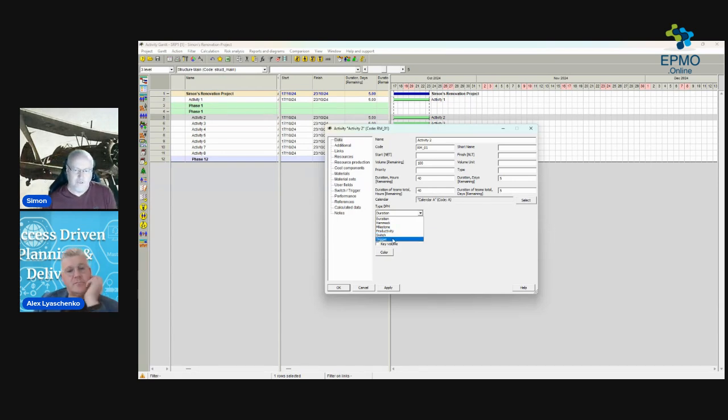So in the project world, productivity would be units. It's like you add more units, it gets done quicker. Same, effort driven. Yes, but when you do effort driven, there is one difference. In effort driven, you're assuming all resources have the same productivity. I don't want to derail here, but you can set how many units are available per resource as well. You can say this one will give less. Let's say it's a smaller bulldozer, it can give less units of effort than this one does. And it's not commonly used. Leave something in the comments if someone has used it previously.